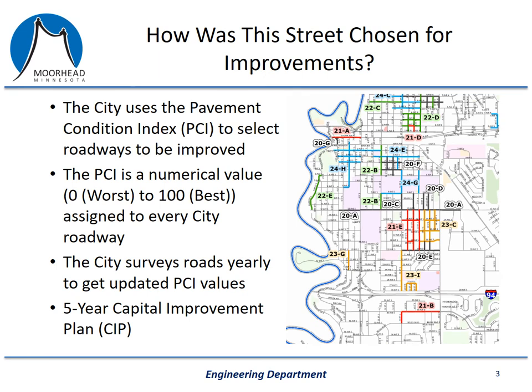You may be wondering how and why your street was chosen for improvements. The city uses a pavement condition index, or PCI for short, and this allows us to create a value — a grade or a score — as a representation of the condition of a road. The PCI is a numerical value with 0 being the worst and 100 being the best. Every street within the city gets one of these values and we update them yearly. The city hires a consultant to evaluate the condition of the road, and we feed that information into our pavement management software, which helps us determine which projects we should do based on our budget for that year.